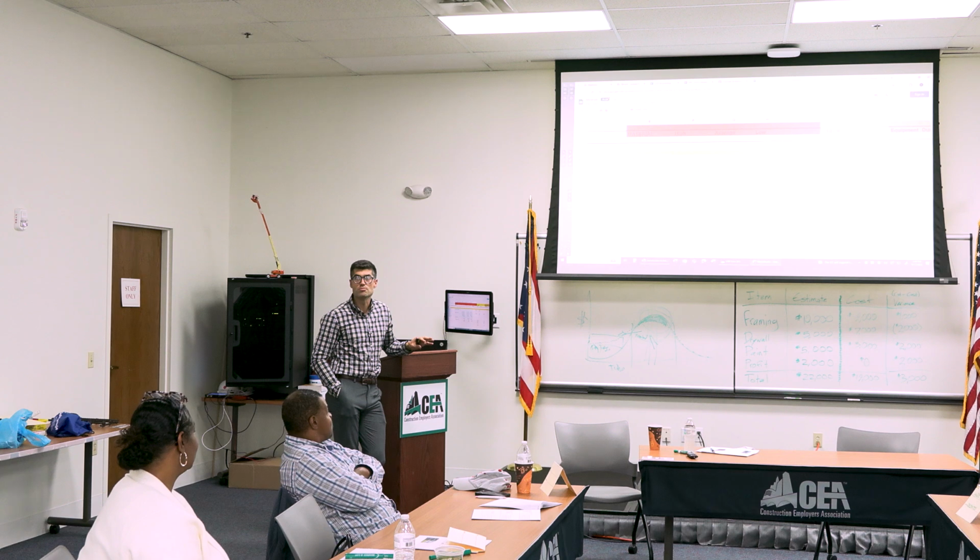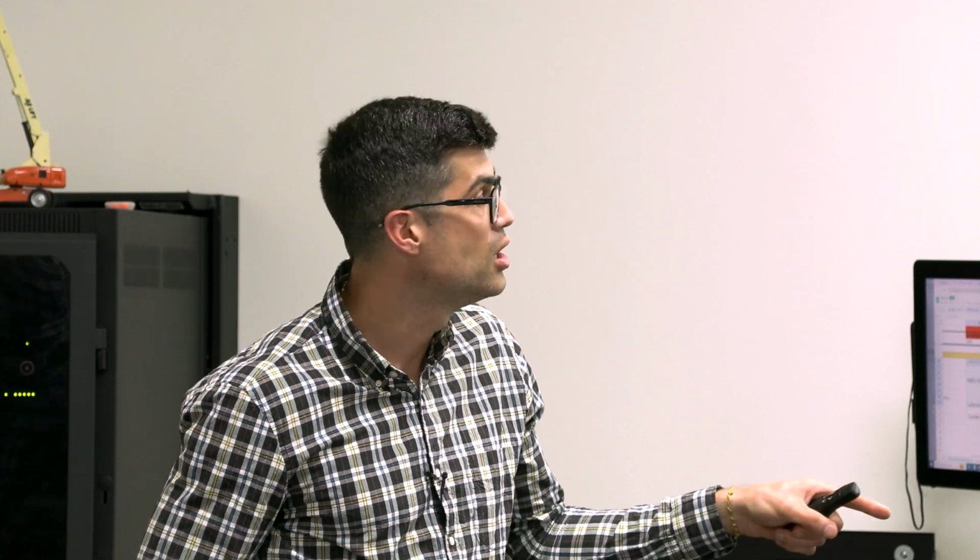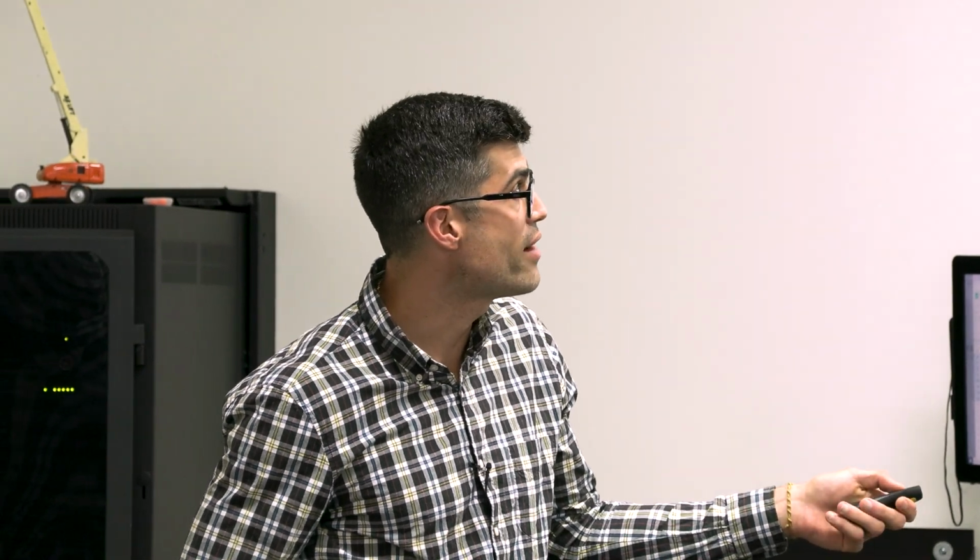And I think what this does, if I presented this to a client, and I have before, they love that you're looking forward, that you're trying to mitigate their risk by providing them options and ranges. And just say, listen, there's a range here, choose, I'm basing off an average, I'm looking out to make sure we don't have a change order in the future. And again, it could be an escalation of cost, it could be product, it could be that stage in the CAD. Instead of putting an allowance, put a range. That way, when you're presenting that estimate, there was nothing that you pulled over their eyes or that they're going to have a question mark with later, right?